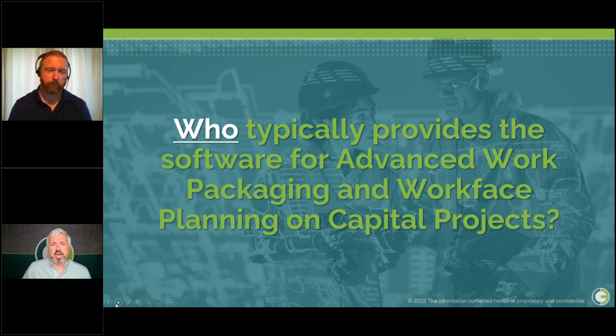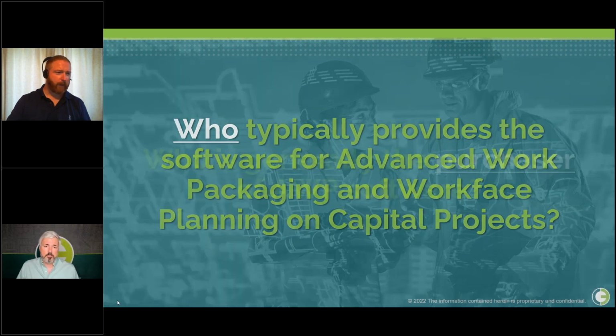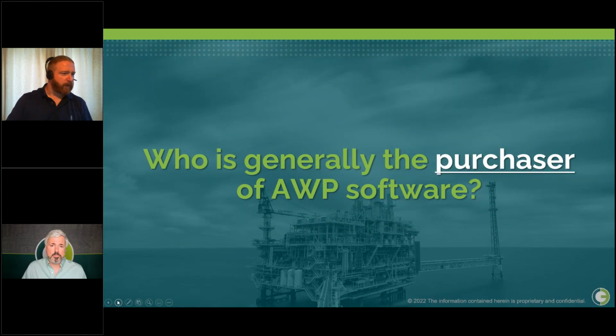The other main reason is timing. The construction contractor process is still heavily weighted towards the traditional three bids and a buy concept, where the contractor is only brought on to the project shortly before construction starts. With that in mind, it's difficult for the contractor to drive the AWP process and establish the necessary platform for AWP software success because they're simply not on the project early enough to do so. Yeah, absolutely. Second question, who is generally the purchaser of AWP software?